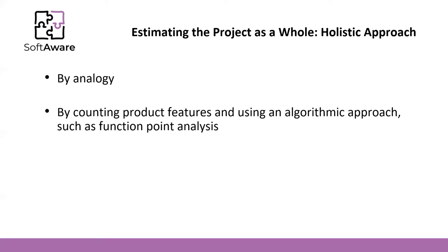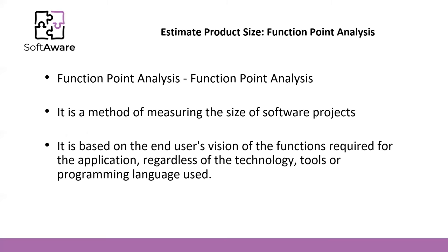There are others but in this course we will talk about function point analysis. Function point analysis is a method of measuring the size of software projects. It is based on the end user's vision of the functions required for the application, regardless of the technology tools or programming languages used.